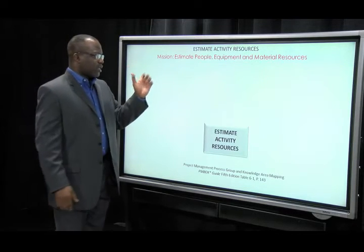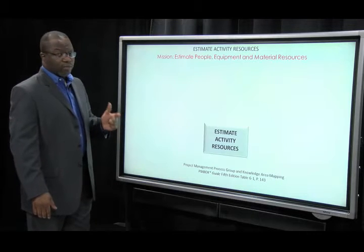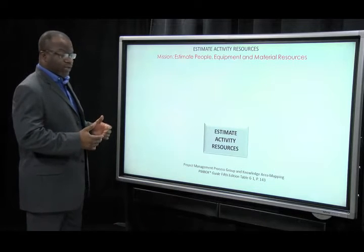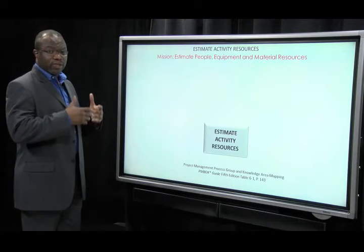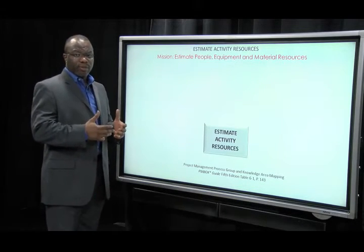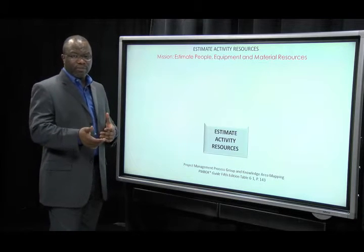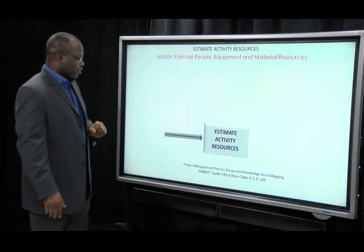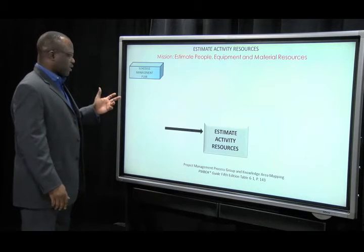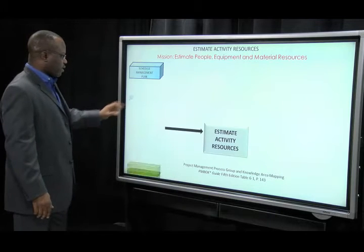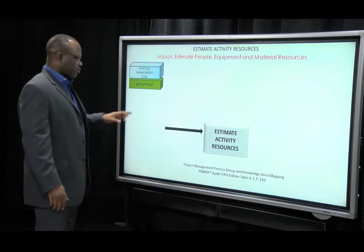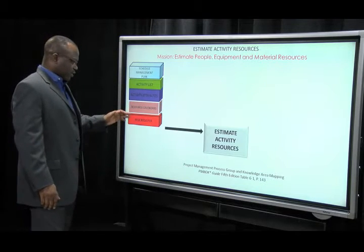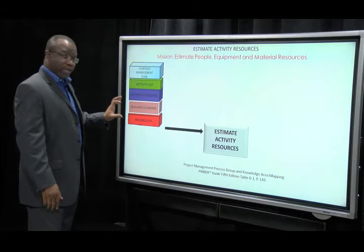Our goal is to estimate people, equipment, and material resources needed to complete the project work. For that reason, you need the people who are actually doing the work to help you come up with ideas of how many people are needed for certain tasks on the project. So let's take a look at the inputs to this: our schedule management plan, activity list, and activity attributes, which we've discussed.